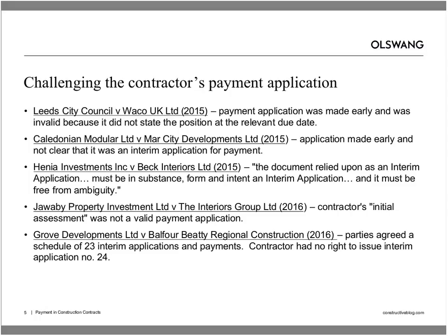So I think just to bring that back to your initial question, yes, the court won't entertain a situation where the contractor is making an application every few days in the hope that the employer trips up and fails to issue a valid payment or pay less notice. The payment applications do have to be made strictly in accordance with the contract.